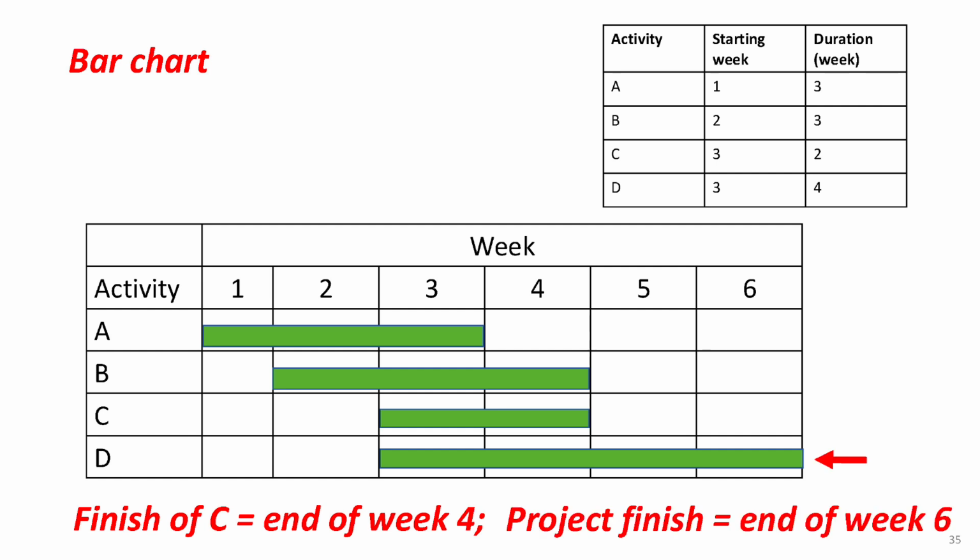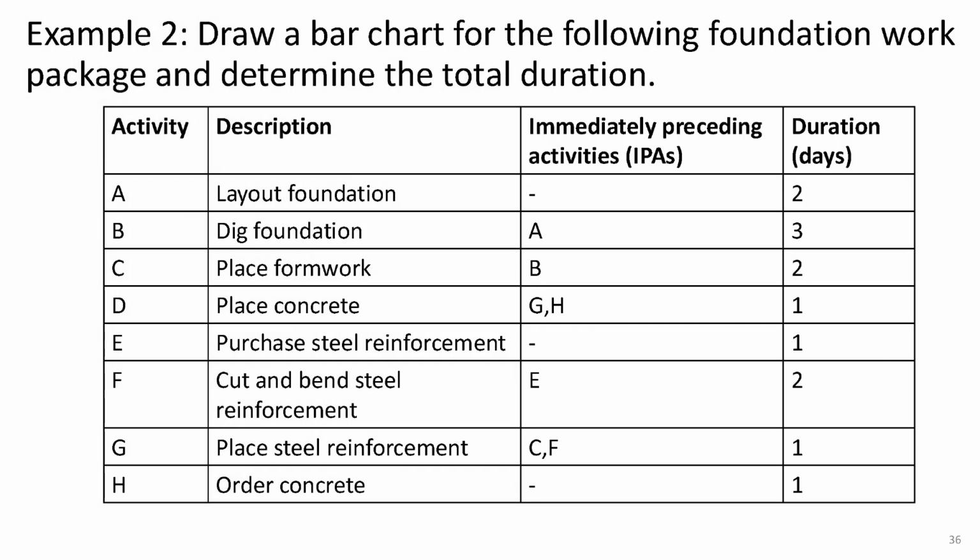What about the project finish date? The project finishes when the last activity is completed. In this case, activity D is the last to finish, so the project's finish date is at the end of week 6.